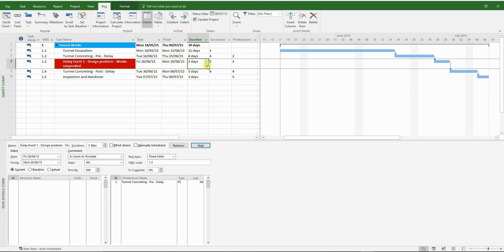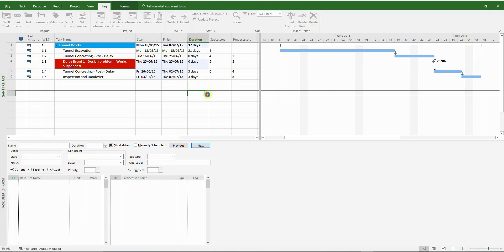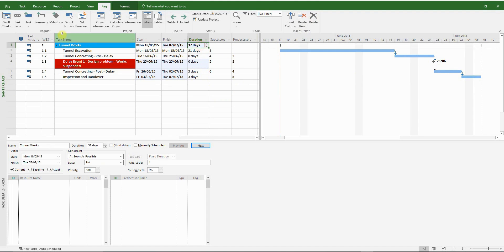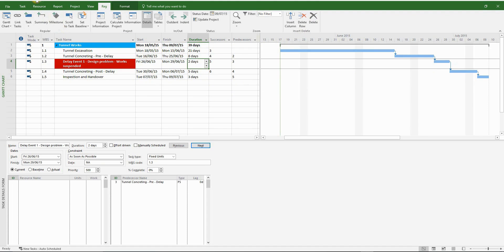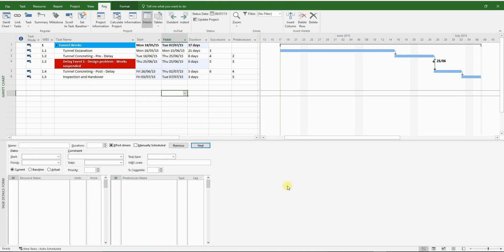Now we can reduce the delay event to zero and watch the program collapse. If I undo it, you can see it's gone from the ninth to the seventh. So that is your collapsed as-built analysis.